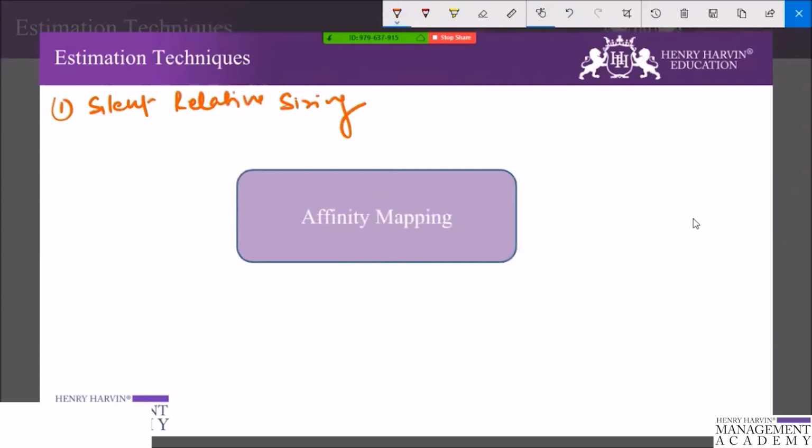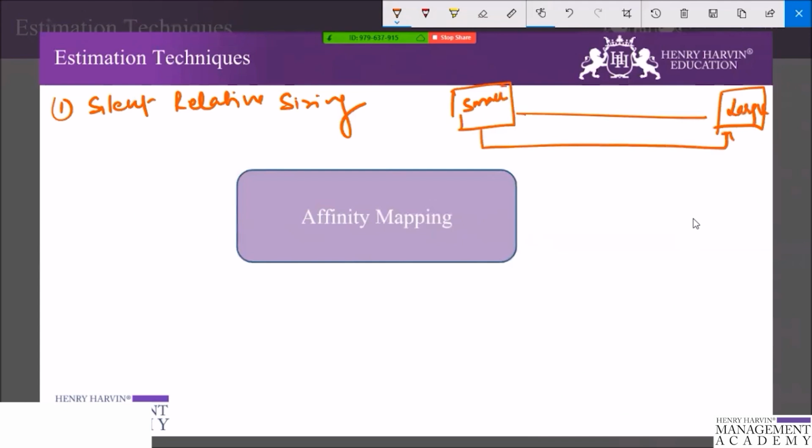So what will happen is that you will place two stickies here and here, which say this is smaller and this is larger, and make sure that there is enough space between smaller and larger, right? As I have shown here, place an X large post-it on the index card on the far left side of the wall with smaller written on it.